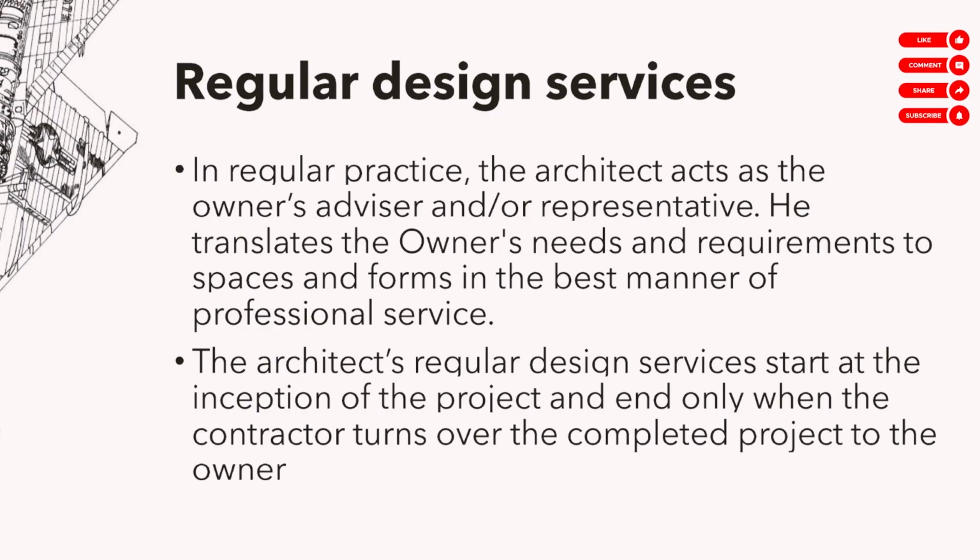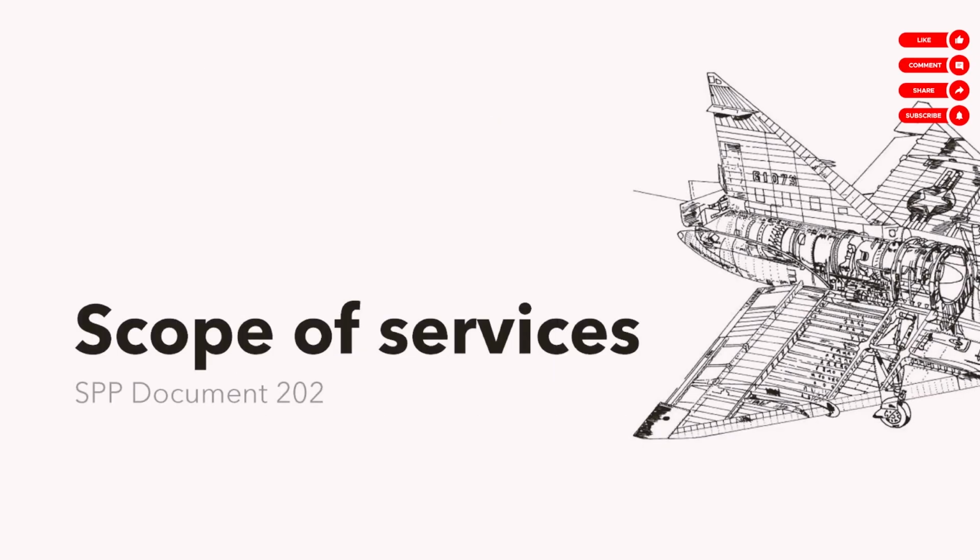No, it begins from the beginning. But the more interesting thing is the end. It ends only when the project is completed and turned over to the owner. The design service, the regular design service, does not end when you finish the design. It ends when the building is finished and it's been turned over to the owner. That's when it ends. Okay, and you'll see that later when we talk about the 6 phases.